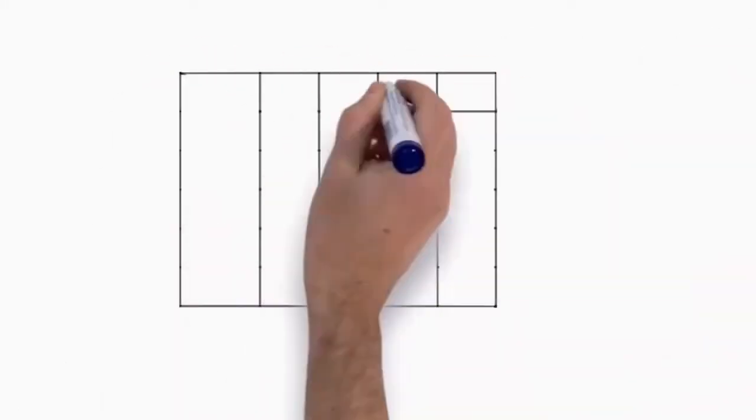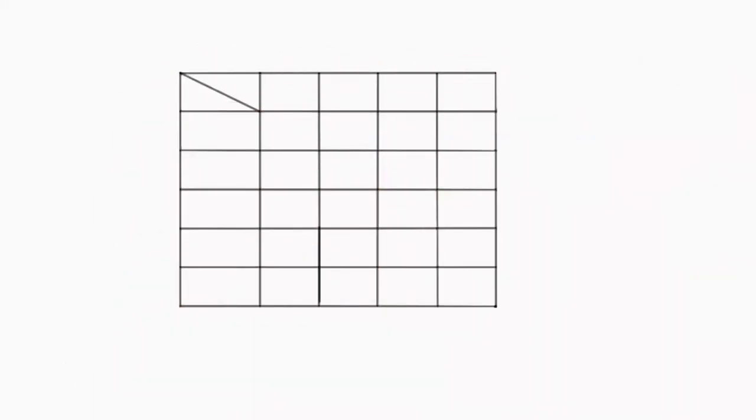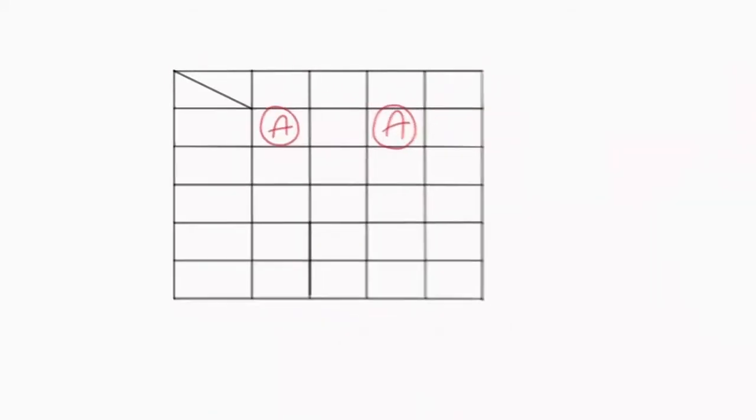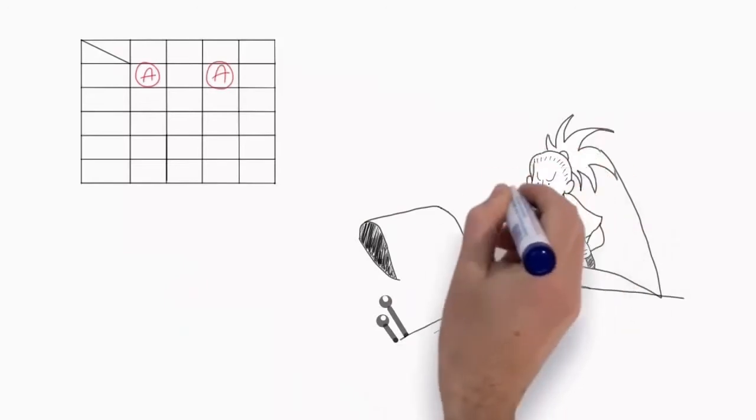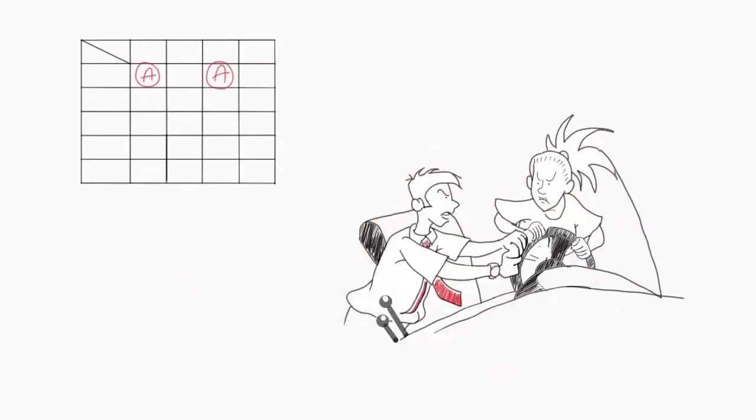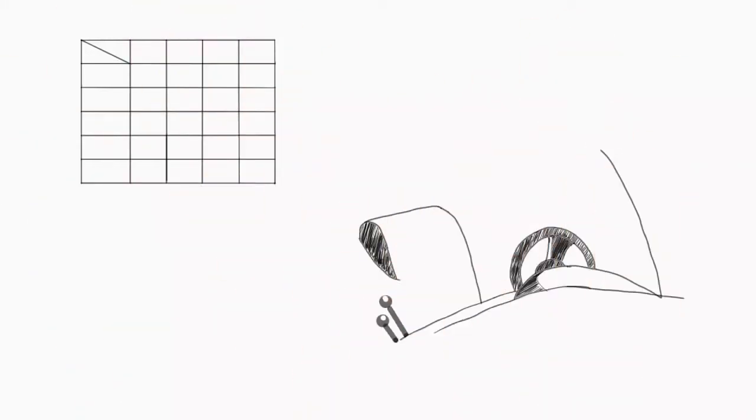An analysis you should perform on your RACI chart is to see if we have more than one A, more than one person accountable. Sorry, that is not possible. Only one role per task can be accountable. You can't have more than one person driving the bus. No A's, this is also not possible, as you need at least one driver on the bus for each activity to be performed.